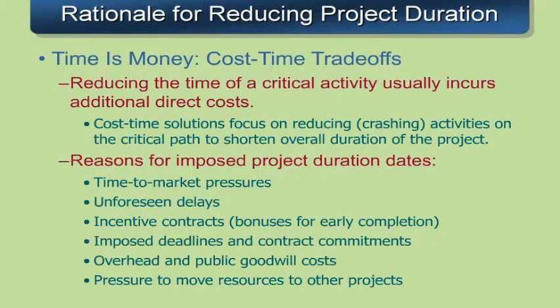But regardless of whether there's a savings or not, there are non-monetary reasons for imposing sooner duration project dates. Things like market pressures, unforeseen delays, promises to customers, bonuses for early completion, and other activities that are listed here all play a role in imposing those shortened duration times.